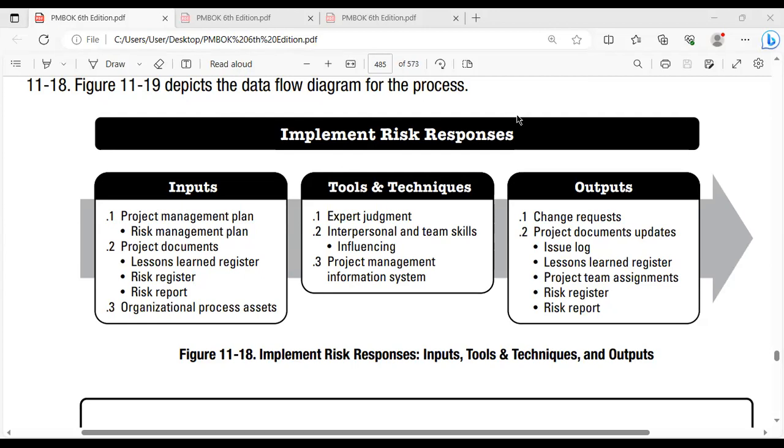Yes, sir. The Ashkel will be listing down various criteria. So make sure that once you are sending your technical documents, to pass through the technical evaluation, you need to match with the technical criteria spelled out by the Ashkel. Once you pass the technical criteria and you are aligned with them, then they will ask you to send the commercial, and they will do the commercial evaluation. They will be asking you to send the quotations.